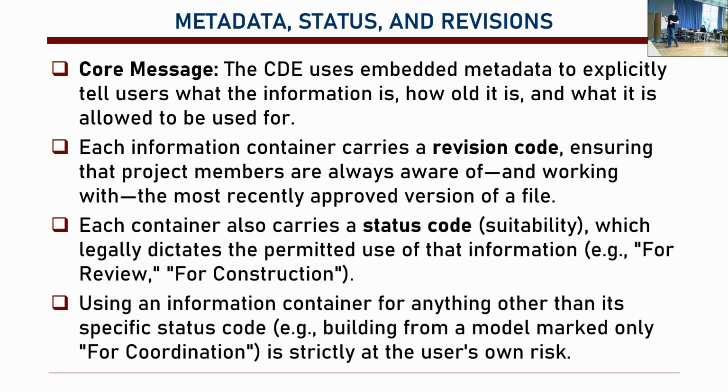Each information container has a revision code. If you make changes, the revision changes. Just like the syllabus at Auto class, it's now version 4. For this course, we have different versions of the syllabus. We update, we put a new one. Now the new one is uploaded, it's version 4. So a revision code, so that we know if we are working with the latest version.